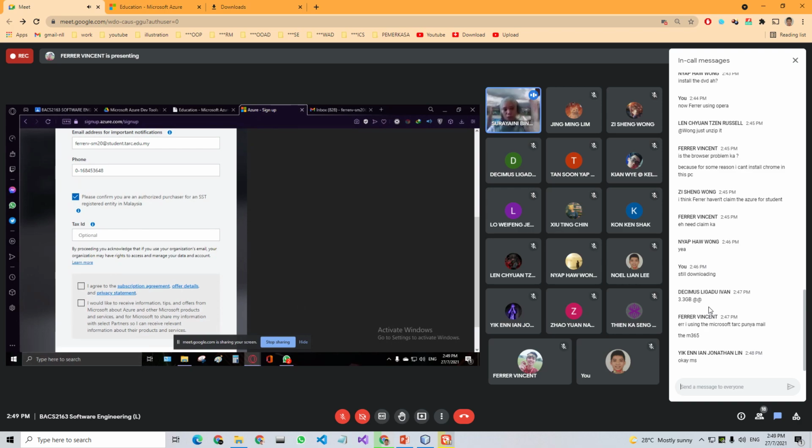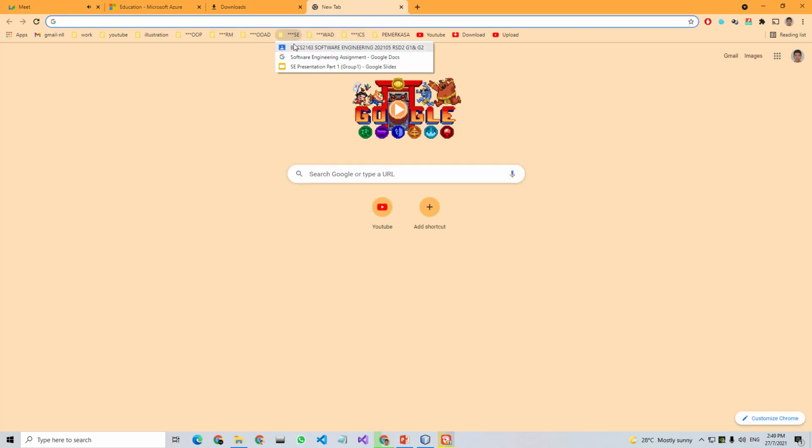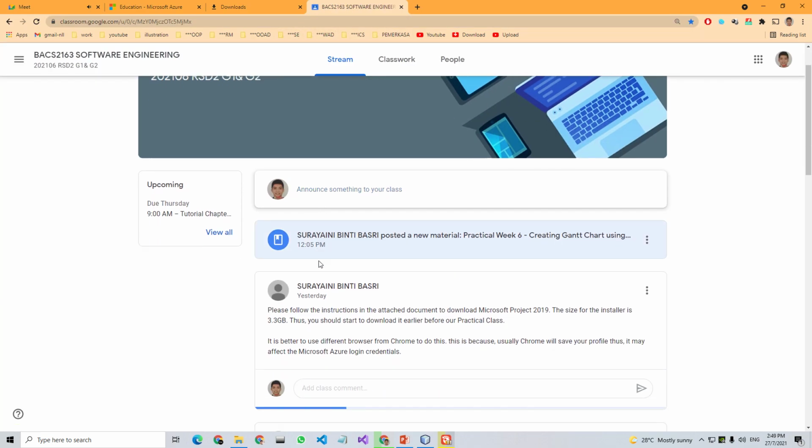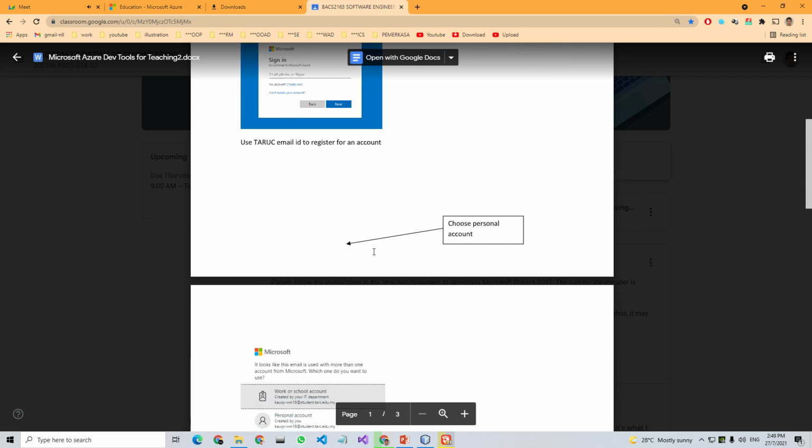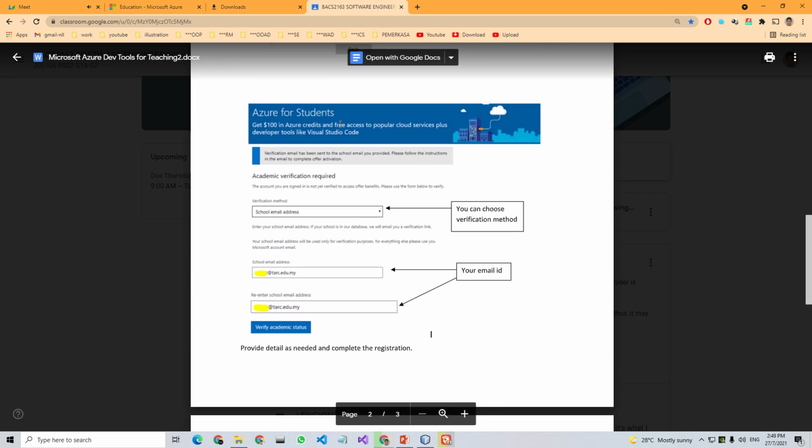If you are using RAD, then you need to make sure that there are some modules that have the same phases, but each of the modules starts at the same time. So that is the connection between the software process model that you chose previously and your Gantt chart. Okay, so the activities inside your Gantt chart are based on the activities in the software process model that you have chosen.